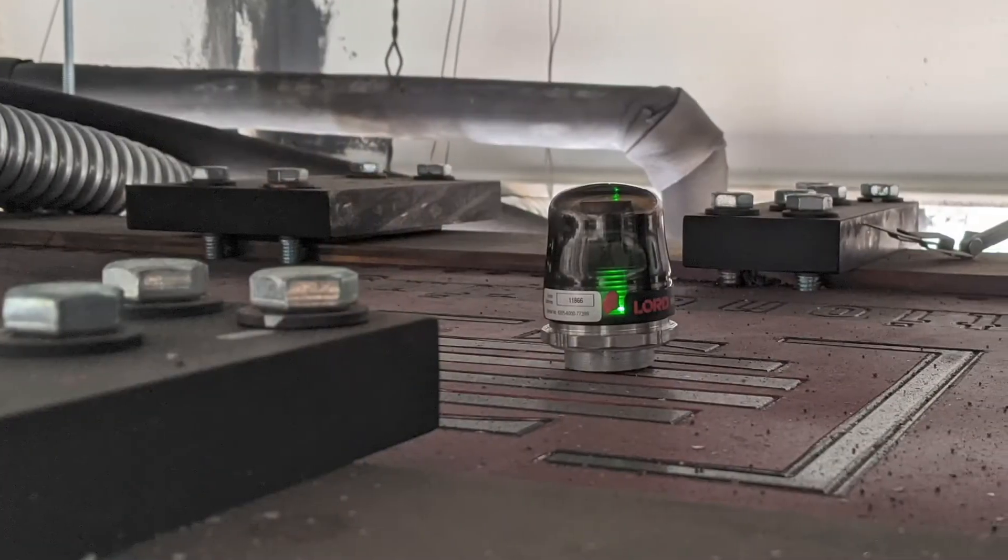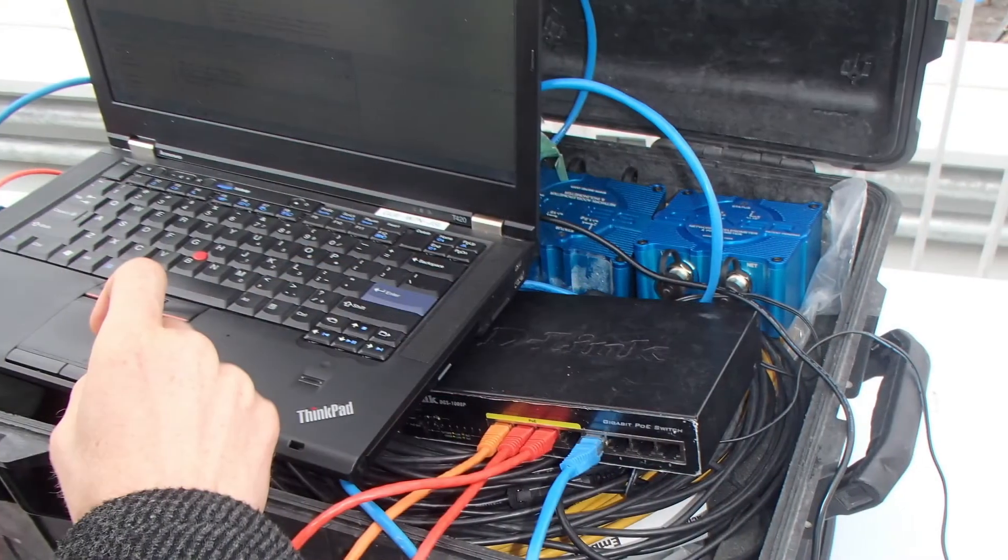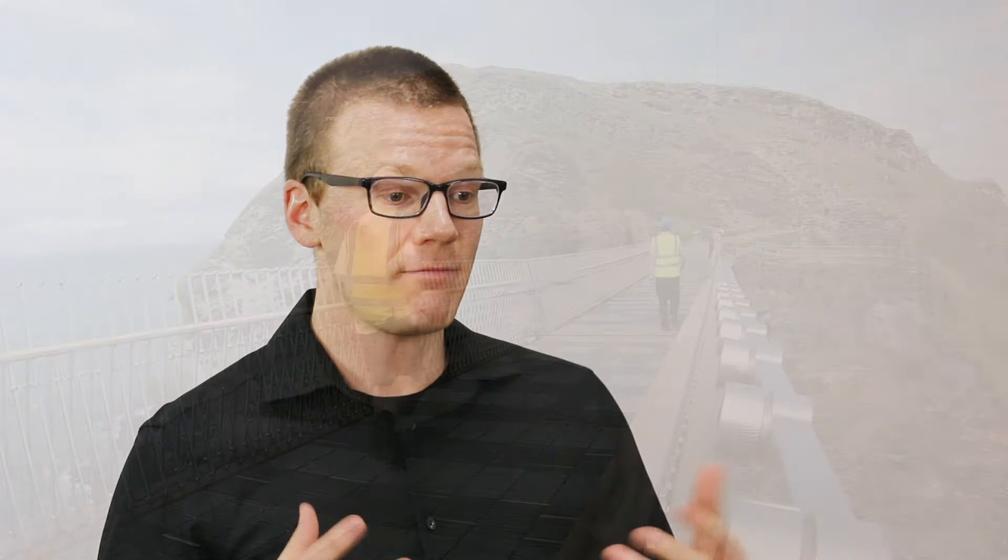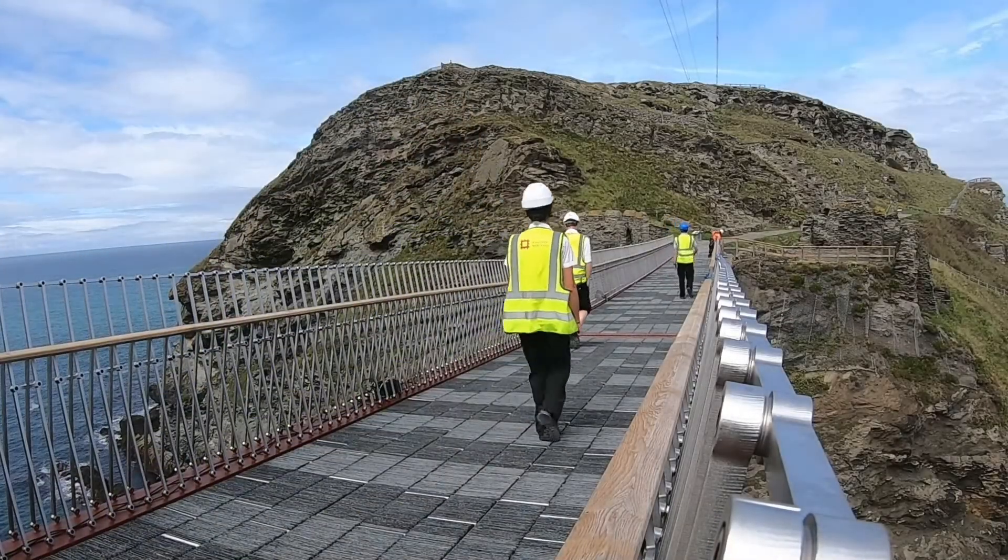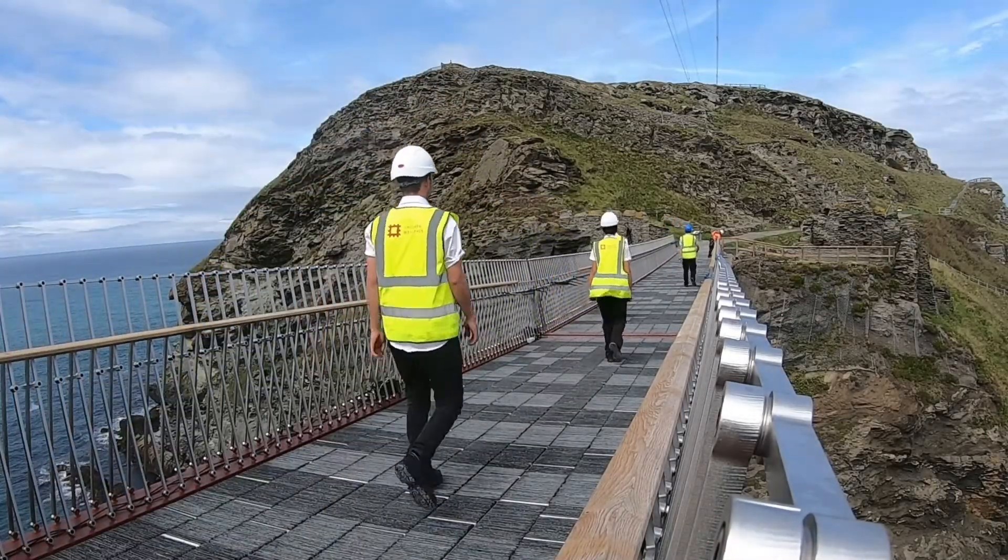When a TMD is installed in a bridge, one of the most important but often overlooked aspect of commissioning that damper is performance verification. Performance verification implies that we do measurements to monitor the motion of the bridge deck and the damper itself to make sure everything is functioning as intended. When we do these measurements, often we're going to have a group of people or maybe a single person walk or jump across the bridge to excite the bridge, and then we can ensure that things are moving and operating as intended.